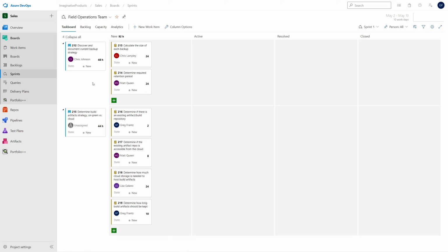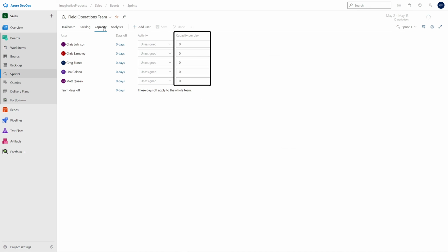To help prevent overloading a sprint, we can use the Capacity Management tool in ADO. This shows the number of hours per day that each team member can work on the project in a given sprint. Since there is commonly unplanned work, we don't want to estimate at 100% capacity and encourage leaving 2 hours in reserve.